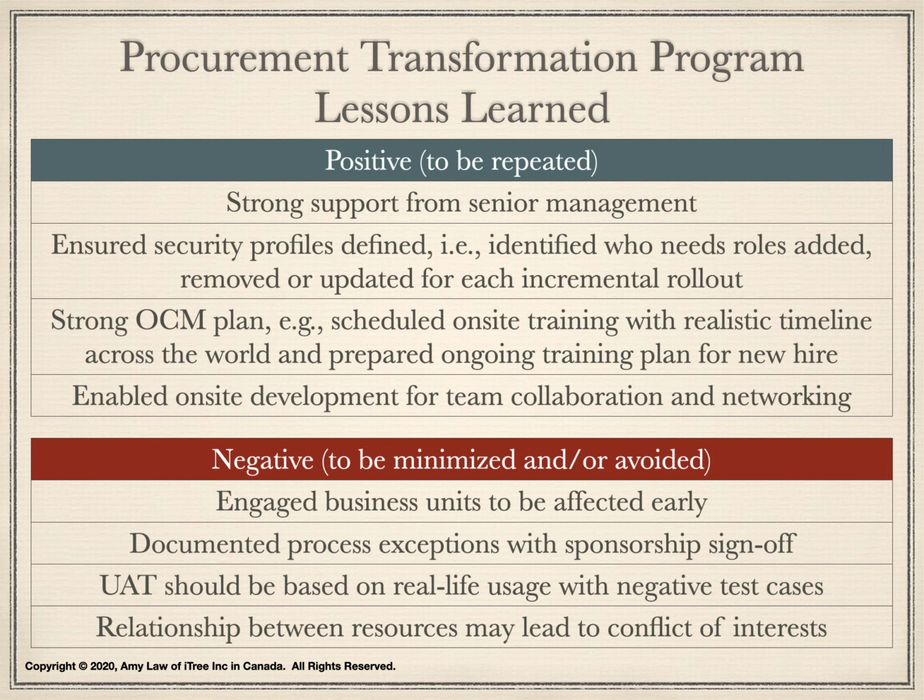We ensured all security profiles were defined with HR and security. We identified who needs roles added, removed, or updated for each incremental rollout.